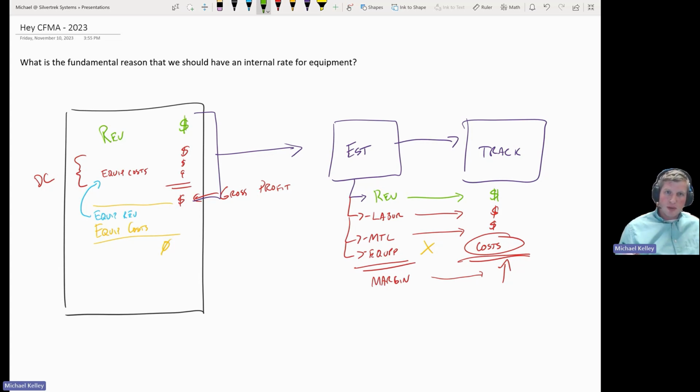It makes your project managers look like a hero, but it's not real, because if we don't have the cost here, then we also don't have the revenue here, and our equipment costs aren't zero. So even though we have a nice high gross profit, it means that we have a very low profit after indirects. This is called margin mirage, and it's a bad thing.